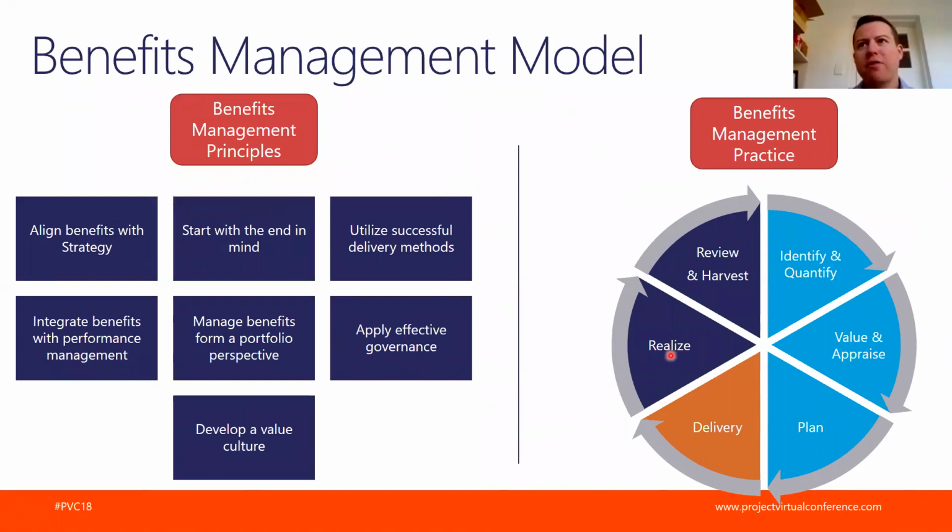On the right-hand side, we have a benefit management cycle, right? So you have to think about a benefit before the project is actually starting. Before the project is starting, you'll have to identify and quantify the benefit that you want, again with the end in mind. So what you want to achieve. And based on that vision, you'll say, all right, I value those benefits and I will appraise them. I will weight them. I will say, all right, this benefit is supposed to bring me that amount of money.